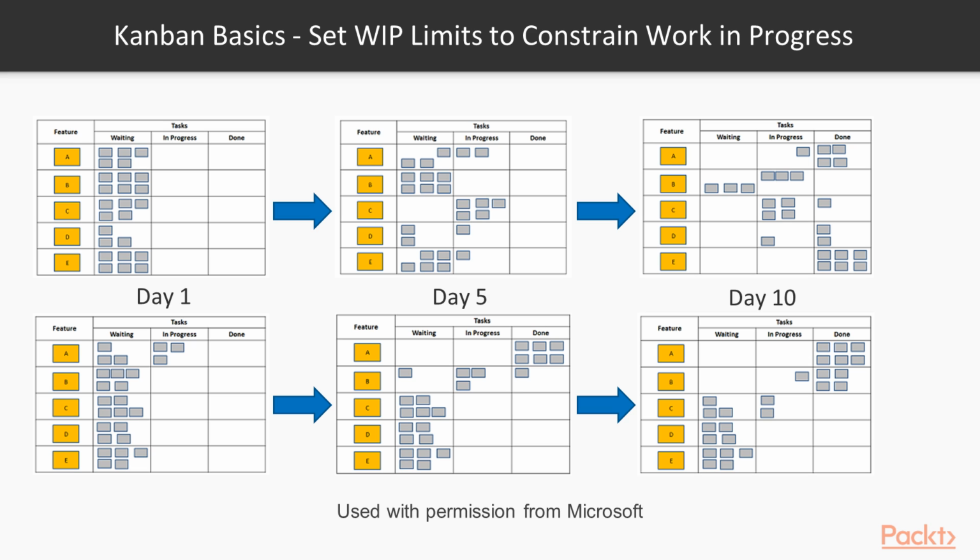Equally, because of the 2-week sprints, they've obviously not completed their work. So therefore, things are going to have to roll over into another sprint. So the estimation's kind of gone wrong. Now let's have a look at the Kanban approach, where actually they've managed to deliver that feature, which they delivered in the first week, and they're nearly completed the second high value feature.